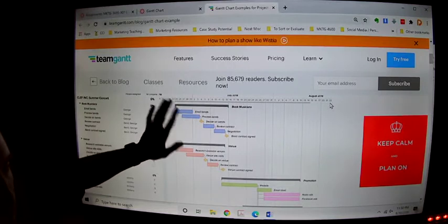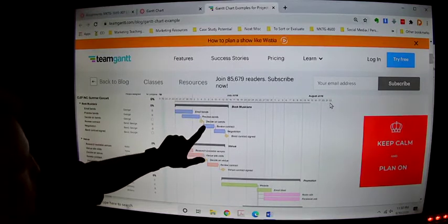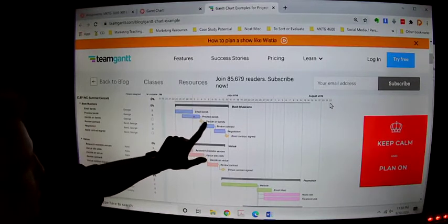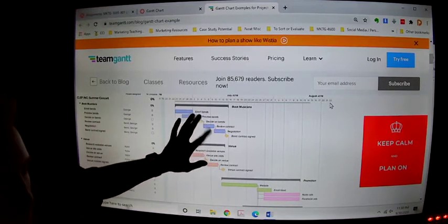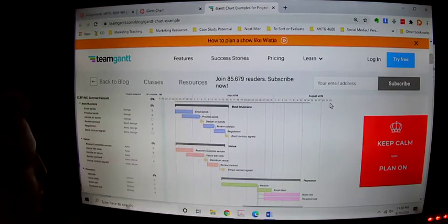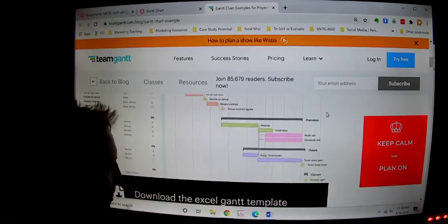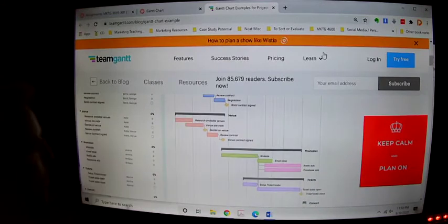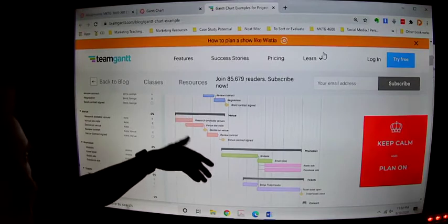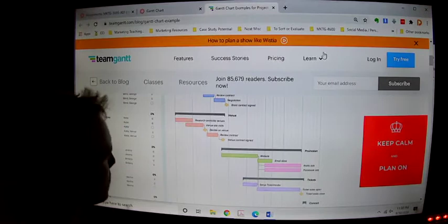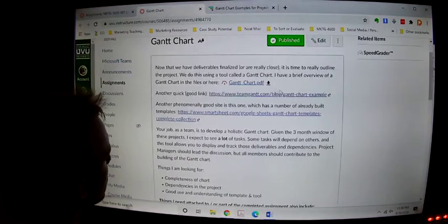So these aren't dependent. But if you look at this one here, okay, this is showing me and saying, okay, this task cannot start till this task's finished. This is a dependency of this task. This is kind of an important point on our project, and on down the various. And so now I have a visualization of the various milestones, of the various tasks, of what's getting done, when is it getting done, and the project being completed. Okay, and again, this is all in the assignment.